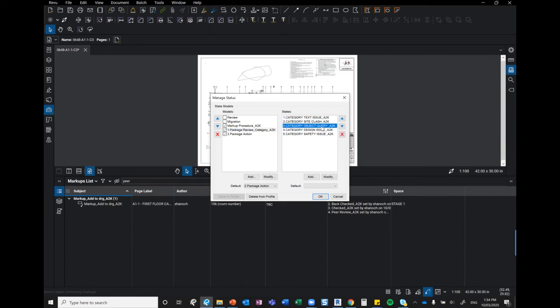Might be an object query. Maybe an object needs to change. Maybe have some design issues. You want to, the reinforcement that's been used, the materials been used on the architecture. And then we have a site safety issue, so category 5. So what we've pointed out to our clients is you can start to use these different categories and isolate them and quickly highlight, oh, we have a category 4 and a 5. We need to hit this now, as opposed to finding out later on when their package is being reviewed, oh, by the way, you got a heap of these category 4s you need to attend to.